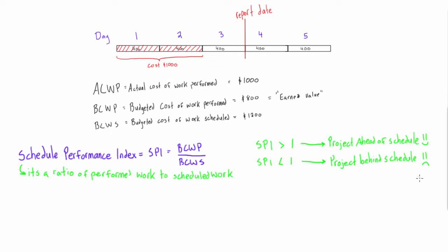The other way to tell if our project is ahead of schedule or behind schedule is by using the schedule variance. It's the difference between budgeted work hours and scheduled work hours. If schedule variance is positive, the project is ahead of schedule, and if schedule variance is negative, the project is behind schedule.